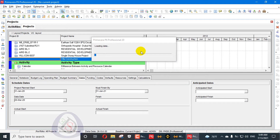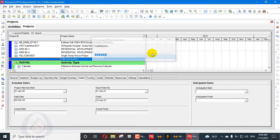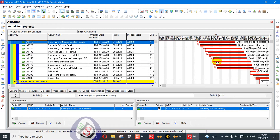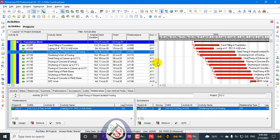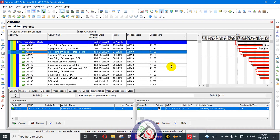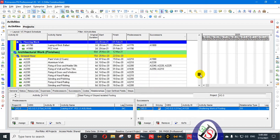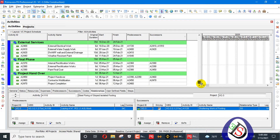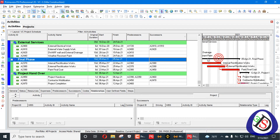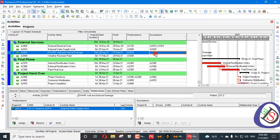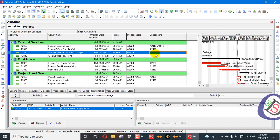I have a villa construction project VC3. I have explained a lot about this project. Now you can see the activity which is open-ended — this activity doesn't have any predecessor or successor. An activity without a successor is a dangling activity.